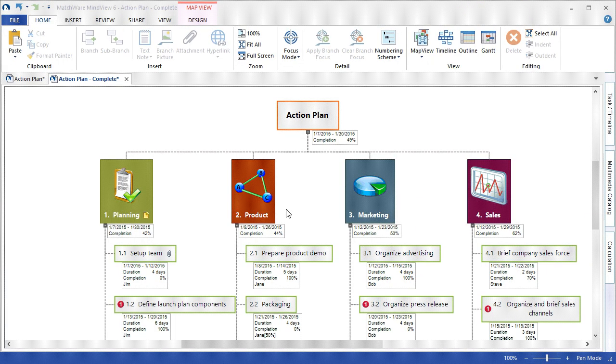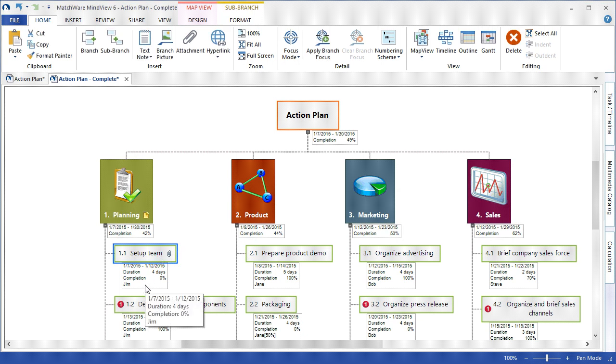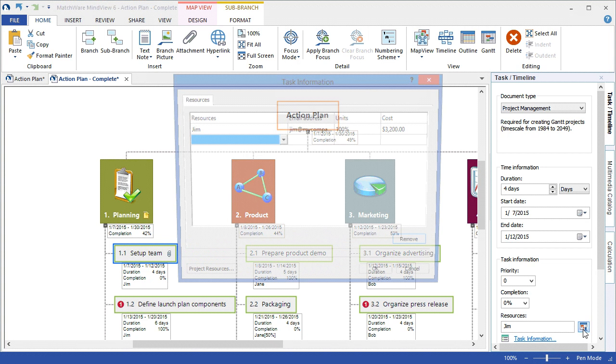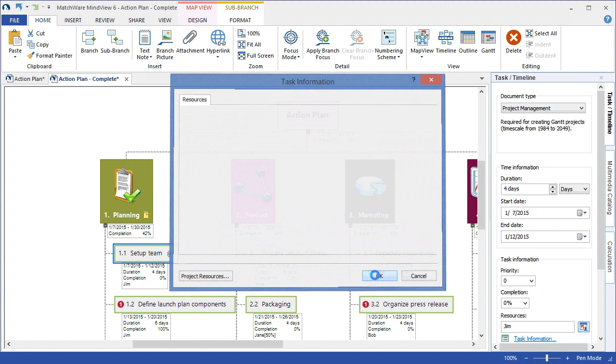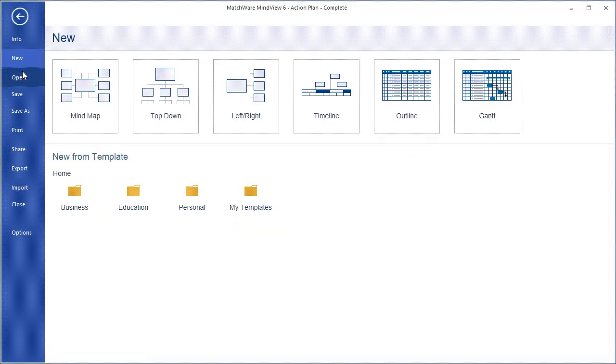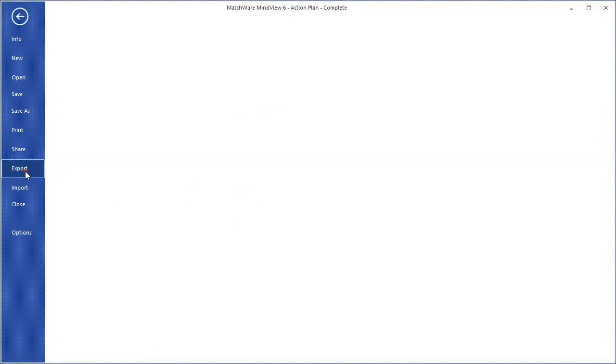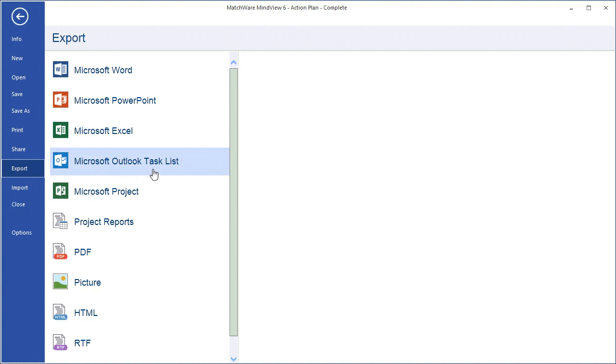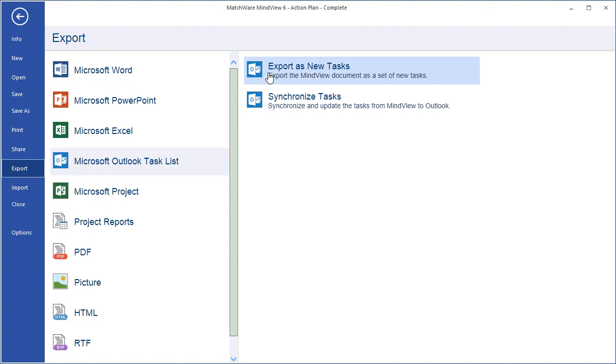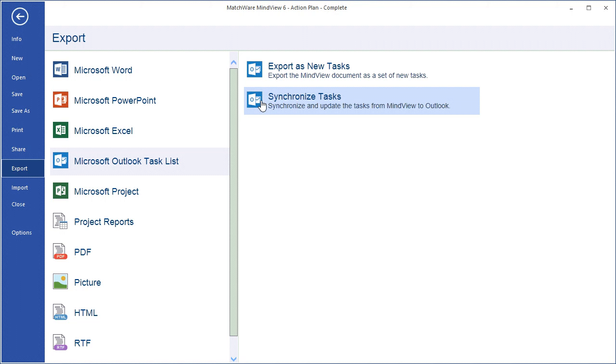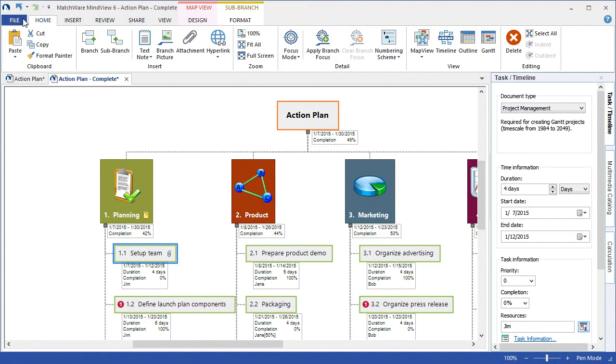MindView also has powerful integration with Microsoft Outlook, where if I assign individual tasks to the specific resources and include that specific resource's email address when I list them as that resource, I can then choose File, Export, Microsoft Outlook, and distribute the tasks to those individual resources' Outlook task lists. That information can be accepted and updated by the resource within Microsoft Outlook, and the MindView document owner can then synchronize between MindView and the Outlook task lists. This gives you a seamless integration to update completion levels and task information.